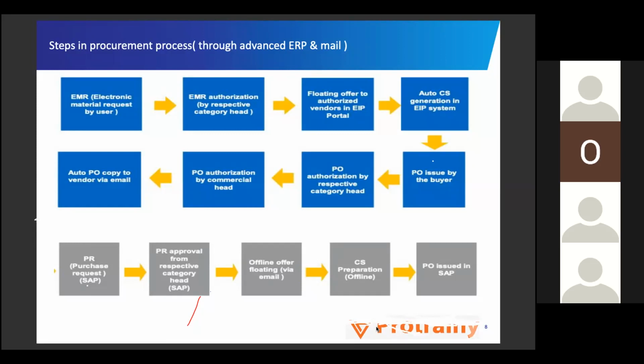we onboard all the vendors into that software, and we send all our inquiries to all the vendors on that platform only. After receiving offers from them, we make the comparison in the software only, and we issue the purchase order also in the software. So that is a kind of software. Okay, sir.